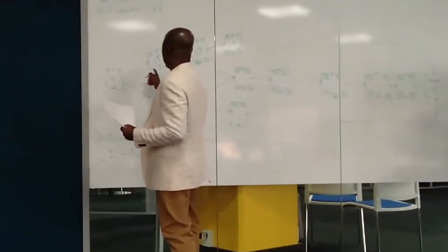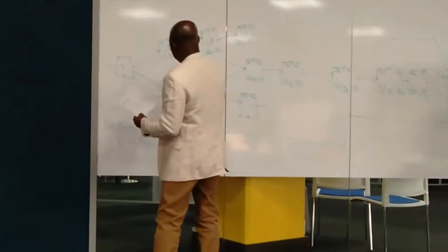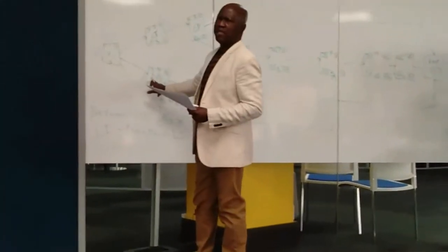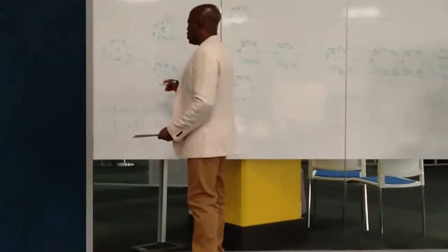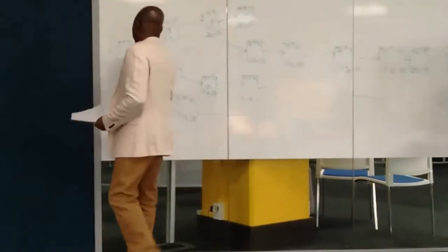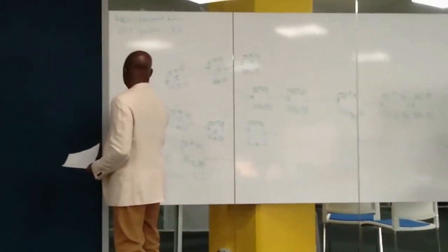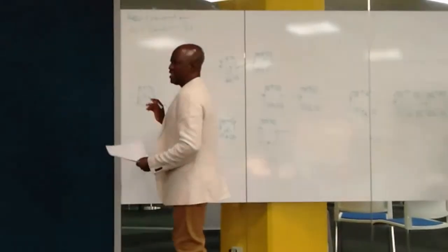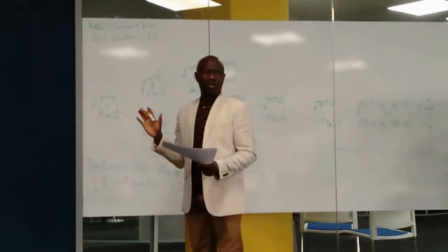This one now, we're working down from here. This is connected to this and this. We're going to use 3 here, because we are working back, we use the minimum. So we bring our 3 here. 3 minus 3 is 0. That's what we're trying to work on. So that's how we work on that.